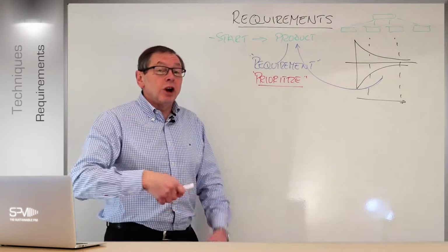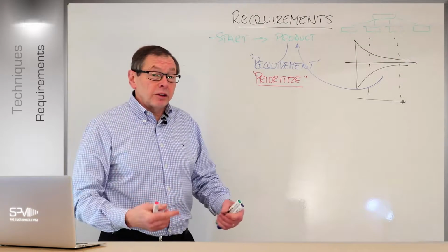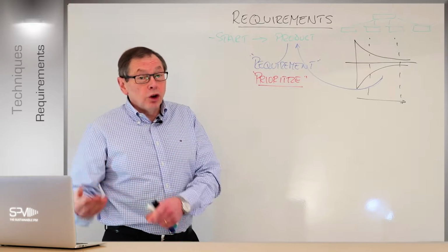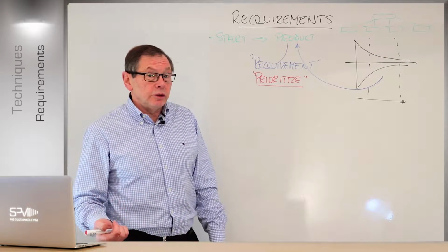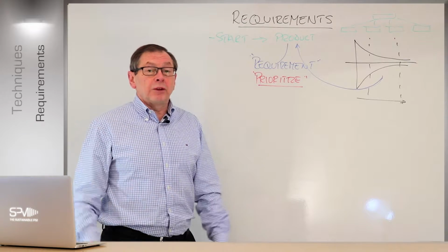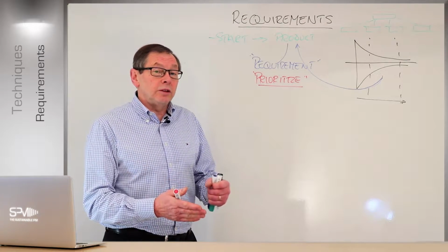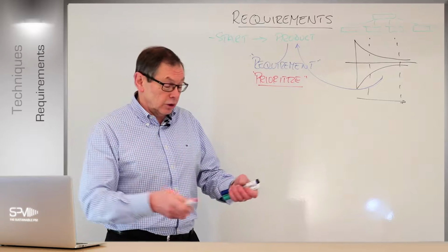Prioritize the product and turn it into a requirement. Because priority says that must be delivered, these should be delivered, and these could be, but we can use those as contingency as well. And therefore what is left over, I won't this time around. That only means really at this point in time, as we go through the project, of course that could change.